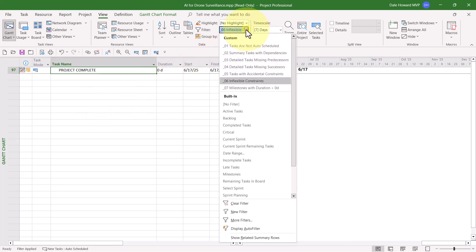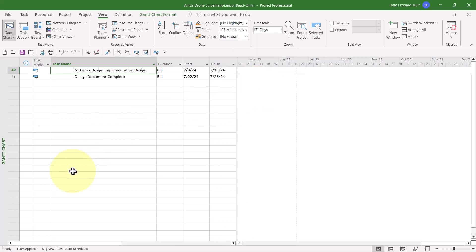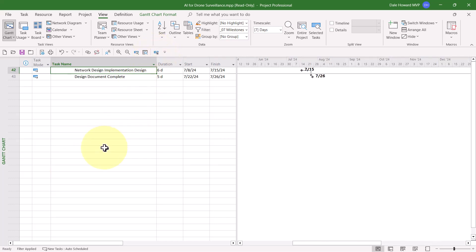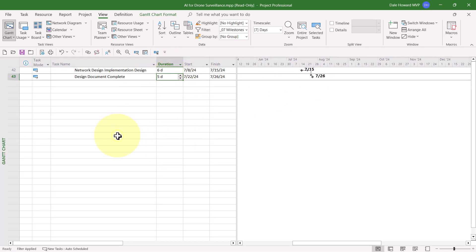So let's go ahead and take a look at the last filter. It's called Milestones with Duration Greater Than Zero Days. At this point, you're probably wondering, wait a minute, Milestones have a duration of zero days. What's going on here? Well, take a look at these two tasks. In the Gantt chart screen, you can see the milestone symbols out here, which is the black diamonds. But look, one task has a duration of six days and the other one has a duration of five days. What in the world is going on here? I can tell you, this is a feature that was added to Microsoft Project many years ago, and I wish Microsoft had never added this feature. It actually allows you to mark a task as a milestone when the duration is greater than zero days. I do not recommend using that feature.